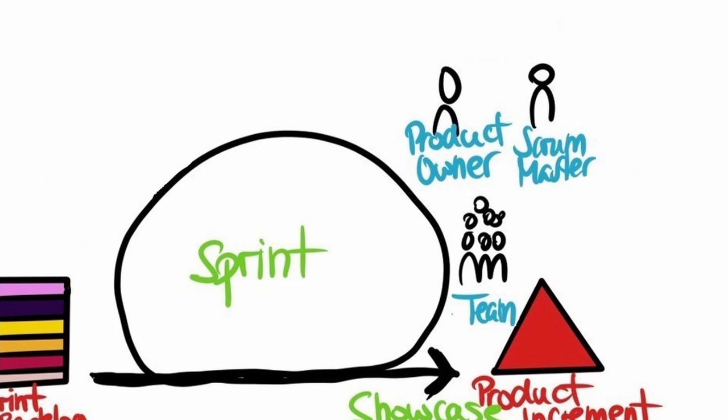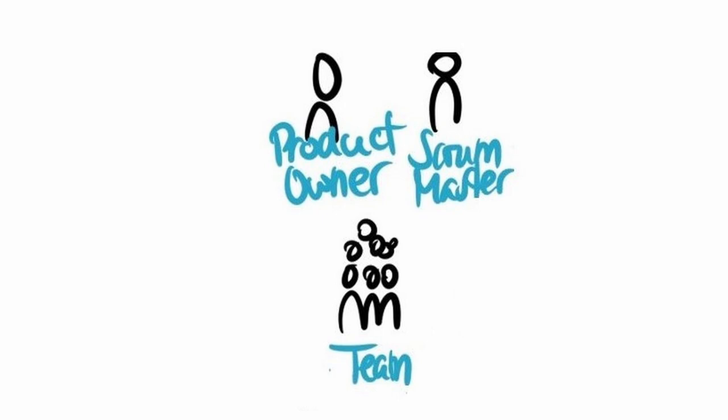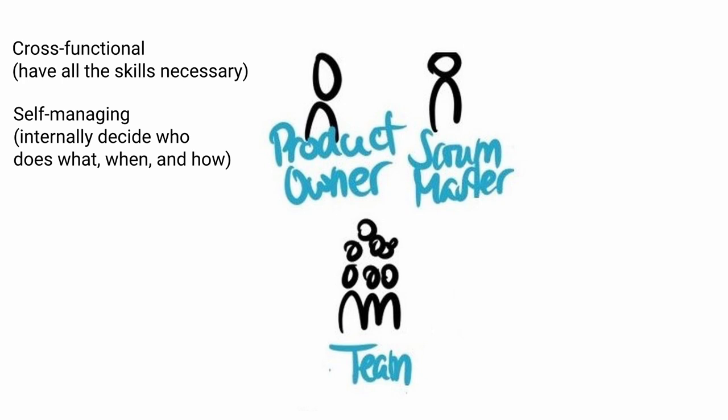Scrum roles. Within Scrum the fundamental unit is the team or squad. There are only three roles within a Scrum team: a Scrum Master, a product owner, and the team members. No hierarchies or complex structures. Scrum teams are cross-functional, meaning the members have all the skills necessary to create value each sprint. They are also self-managing, meaning they internally decide who does what, when and how. The Scrum team should be small enough to remain nimble but large enough to complete significant work within a sprint — typically ten or fewer people.